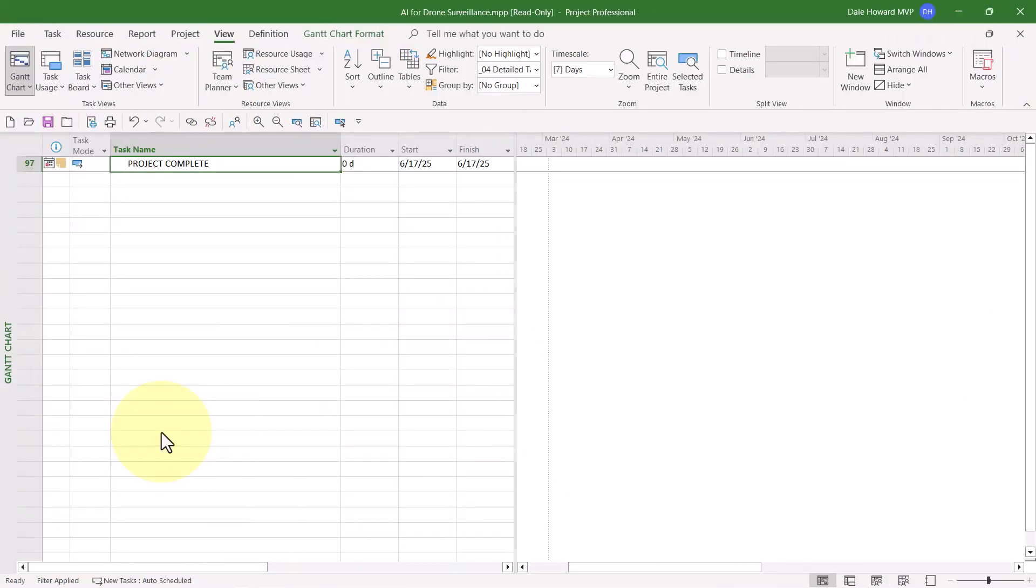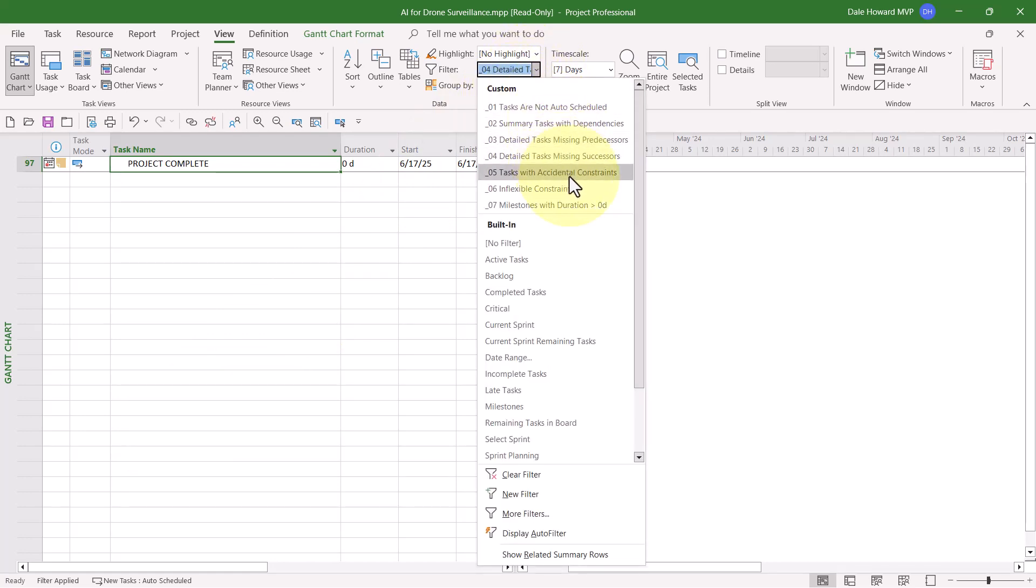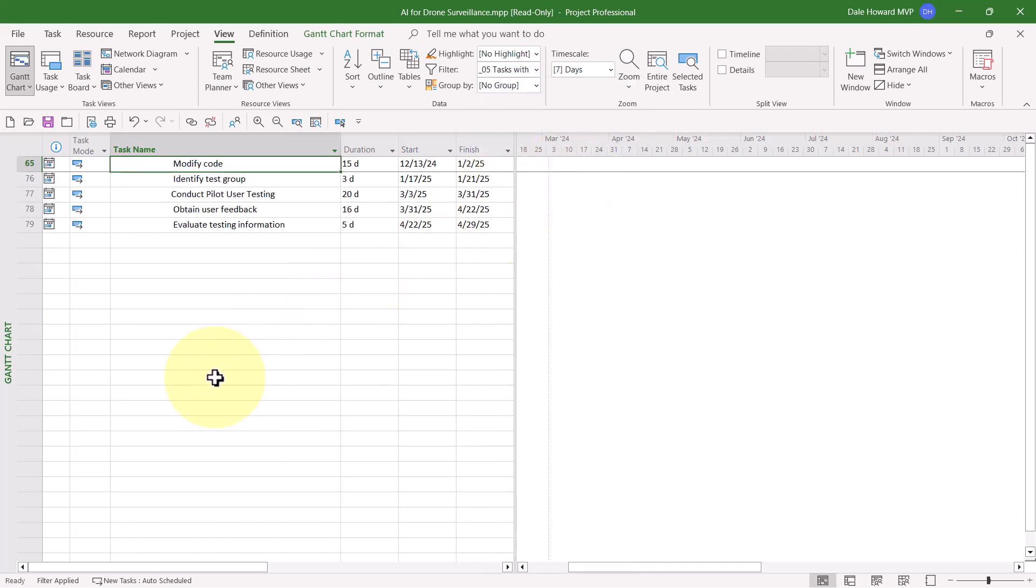All right, let's go ahead and look at the fifth filter, which is Tasks with Accidental Constraints. Now you're probably wondering, well, what is a task with an accidental constraint? In Microsoft Project, if you manually type a start date, Microsoft Project will automatically apply a constraint called start no earlier than. And if you manually type a finish date for a task, Microsoft Project will automatically apply a finish no earlier than constraint. Those are what I call accidental constraints because the software did it without asking your permission.